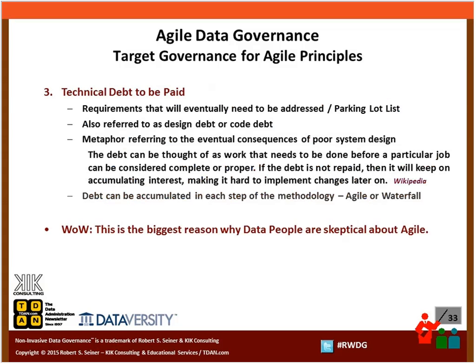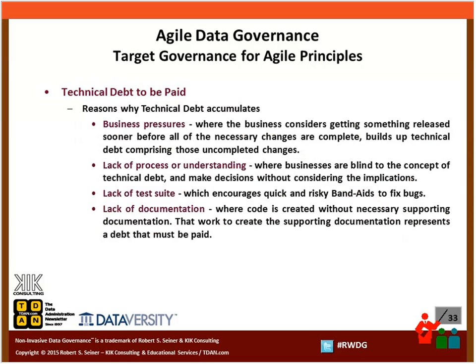The third principle is technical debt. For those not familiar, technical debt is typically requirements that get put on a parking lot list — things that need to be talked about but can't be addressed right now because it would prevent the project from moving forward. One of the biggest problems data people have with agile projects is that the technical debt is not being addressed. The truth is that the existence of technical debt isn't the problem — the problem is that the technical debt itself is not being governed. We need to apply governance to make sure technical debt does not accumulate unchecked.